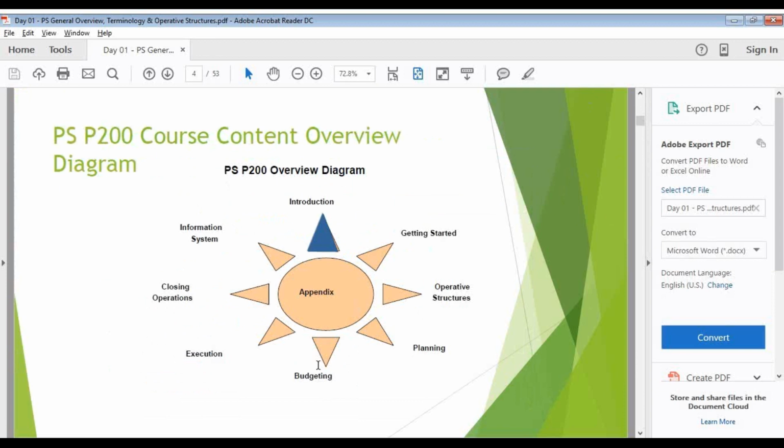Once I am done with my budgeting and have allocated my budget, I have to release the budget. Until and unless I release my budget in SAP, these budgets are not allocated to a particular WBS. Creating a budget and assigning a budget is a different thing, but we have to release the budget. Again, in budget we can enhance the budget, we can transfer the budget, and we can supplement the budget. There are a lot more things in budget.